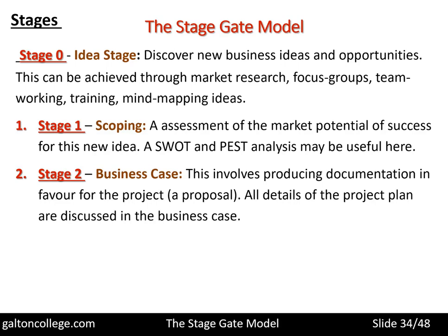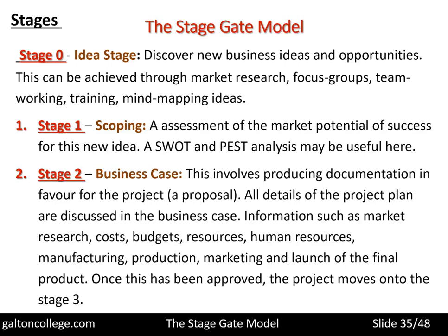Building the business case has to be extremely honest, extremely impartial. It has to honestly look at every aspect and as accurately as possible cost each part and look at the likely price of the product in the market at the end and do an assessment as to whether it is worthwhile. But information such as market research, costs, budgets, resources, human resources, manufacturing, production, marketing and launch of the final product, all of these things need to be taken into account.